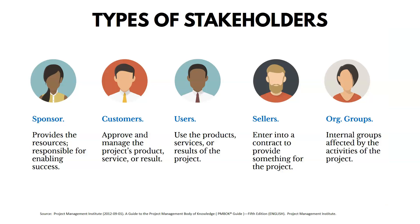Here are different types of stakeholders. A sponsor is the person providing the resources and responsible for enabling success. Customers are the ones approving and managing the project's product, service, or result. Users are those actually using the output or results of the project. Sellers are people entering into a contract to provide something for the project — on a construction project, for example, an outside company hired to lay the concrete. Other organizational groups are internal groups affected by the activities of the project.